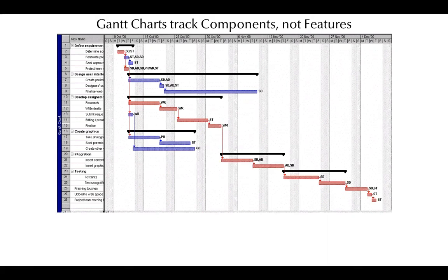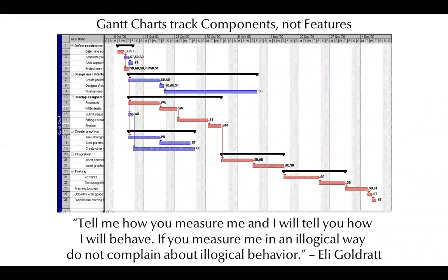Now, in the agile world, we poo-poo Gantt charts. We think this is a silly way to go about this. And part of the reason we think it's silly is if we're trying to deliver features, then you can construct a Gantt chart for feature delivery, but it has no finish start dependencies because you can reprioritize. And if you have no finish start dependencies, you can always mock things out if you need to. That doesn't mean you can deliver the features, but at least you can get things built and you can make certain you're accounting for the most effective way to bring those features to market.